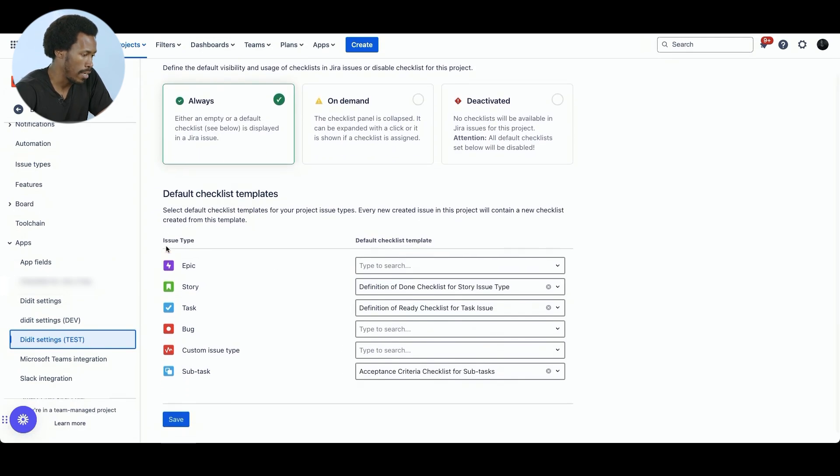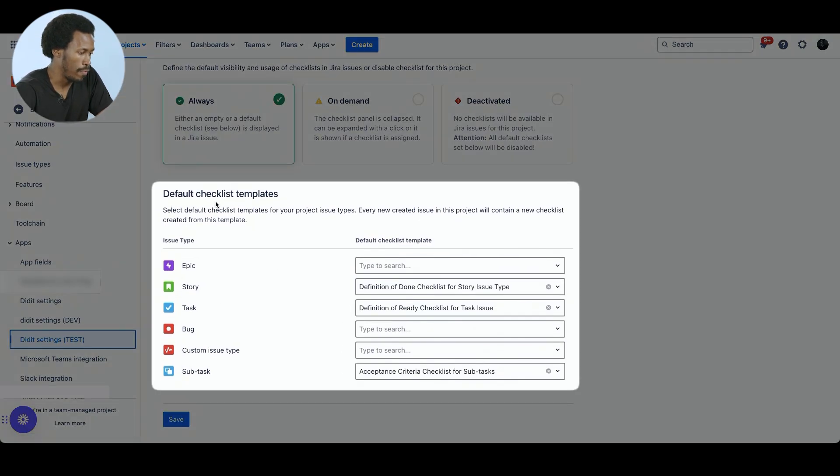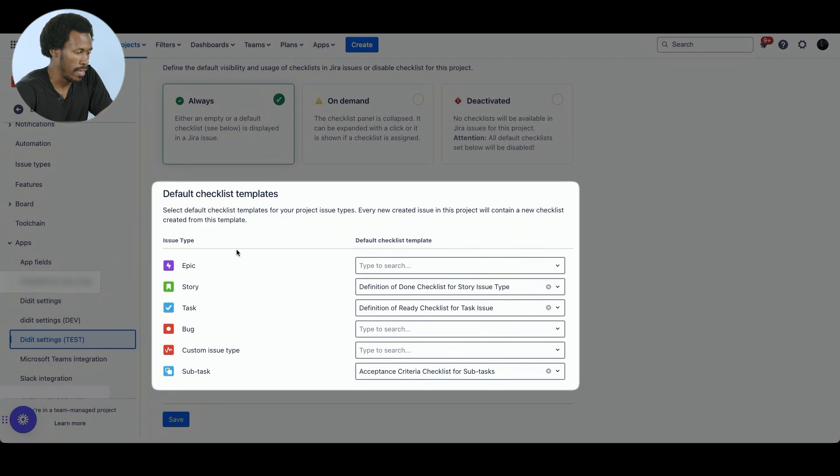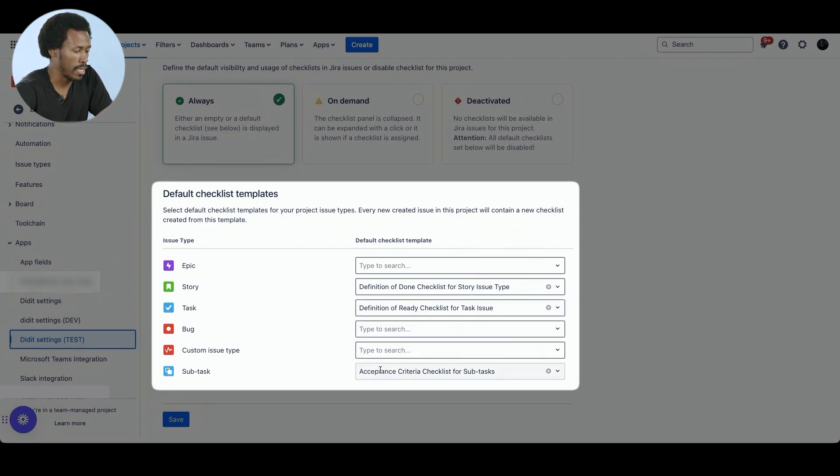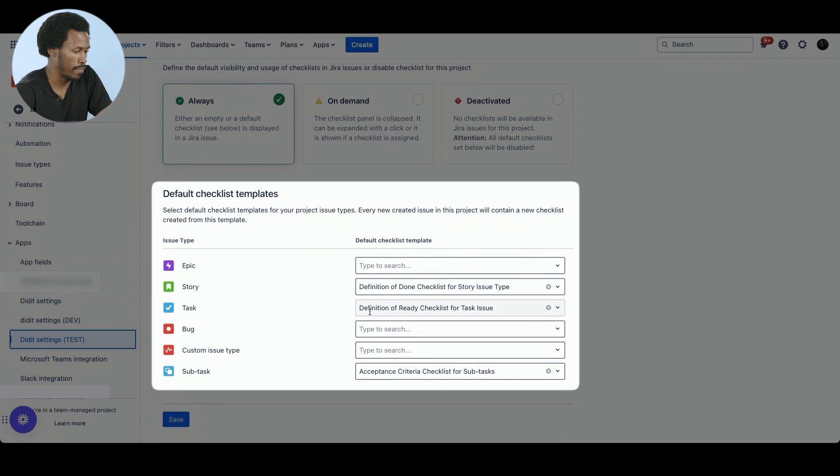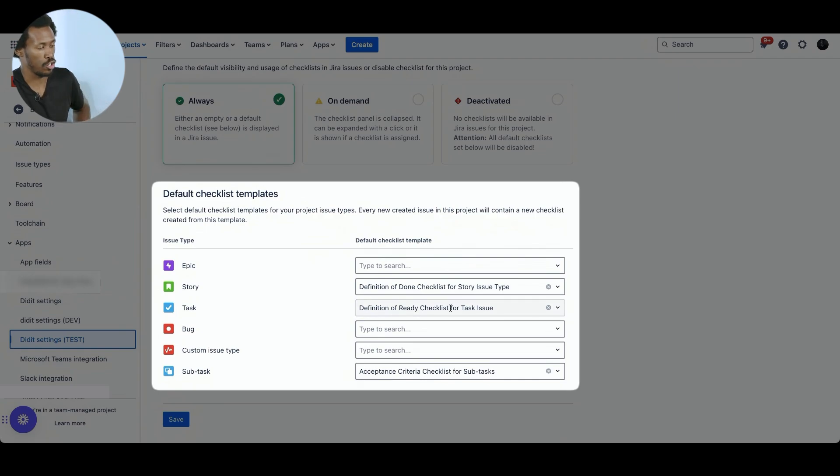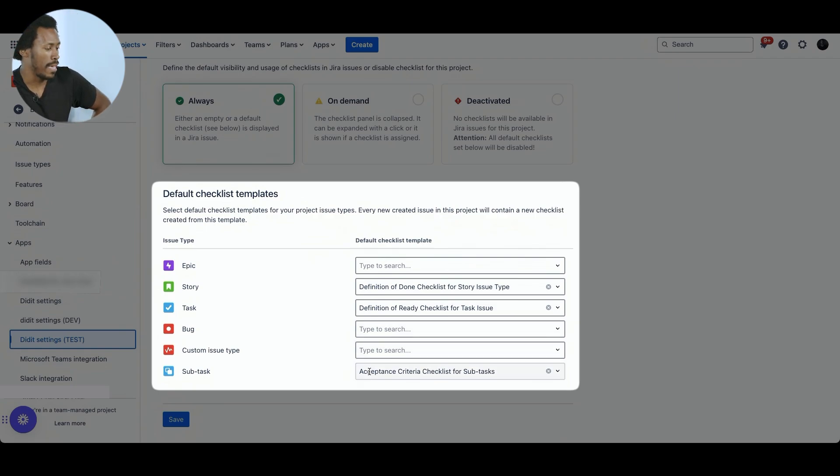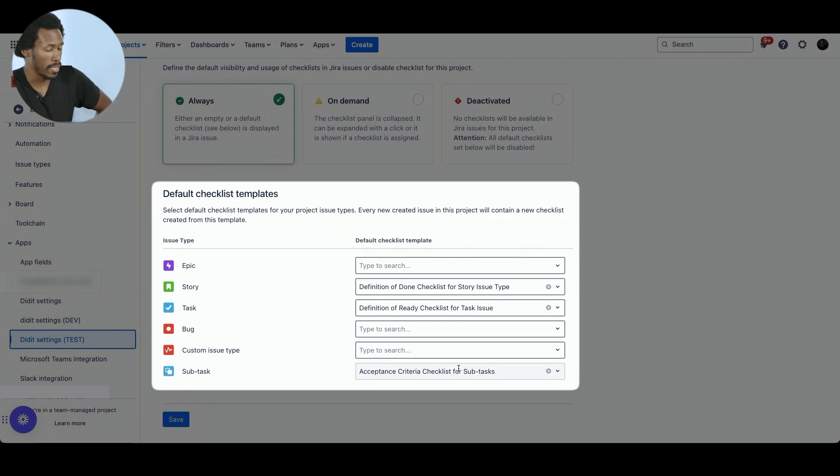Here you can see within the default checklist templates, a number of issue types which have specific templates which are assigned to them by default. So for instance, we have story, definition of done checklist for a story issue type. Then we have definition of ready checklist for task issue. And then we have acceptance criteria checklist for subtasks.